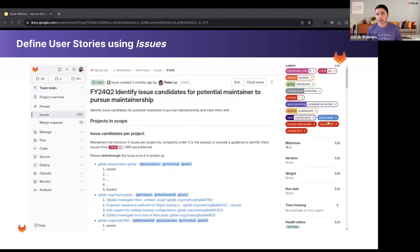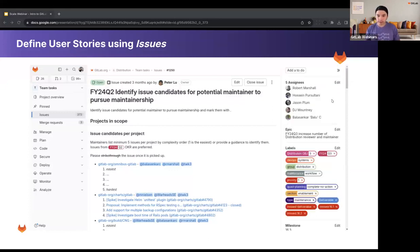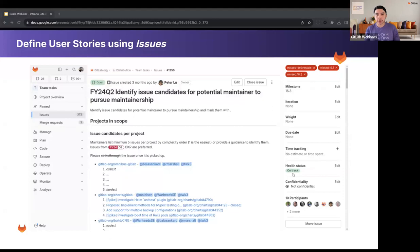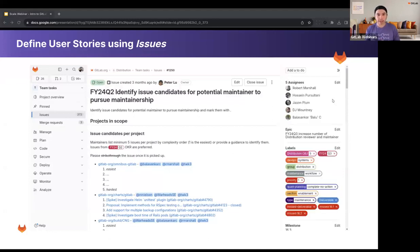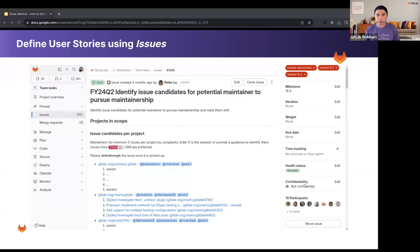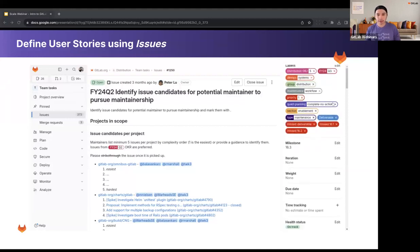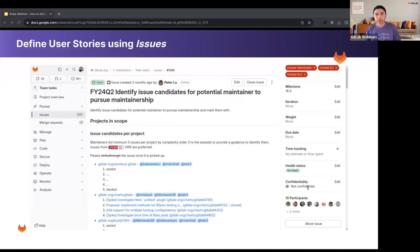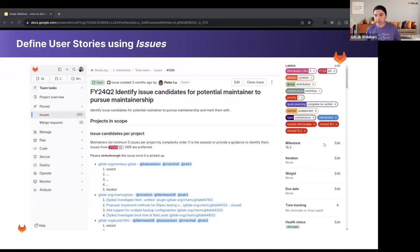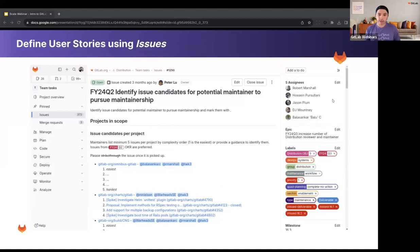You've also got the due date, time tracking — showing estimated time needed and how much time has been spent — and health status in the ultimate tier to determine whether an issue is on track, needs attention, or at risk. To enter and remove time tracking data, you use quick actions in the comments field of an issue. A quick action is a forward slash followed by the name of the action — a quick way to trigger functionality within GitLab, including setting estimated time and tracking time spent.